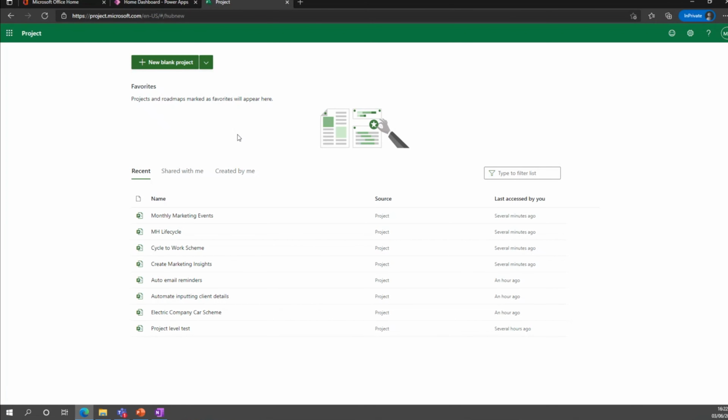Project app business case. I'm not going to spend ages doing this because I think you get the gist of these types of forms. So, rating. This is a simple prioritization model. It's just saying, is it aligning to our strategic direction or strategic plans? What's the cost of this? So it's a low cost, it's an extreme strategic alignment, and we're going to keep all our employees, and there's no risk at all. So this is a super fantastic project idea. The budget is £10,000, and the benefit is £50,000 over 5 years or whatever it is.